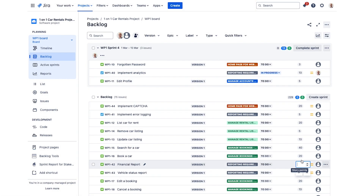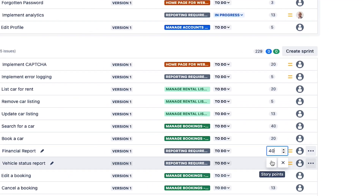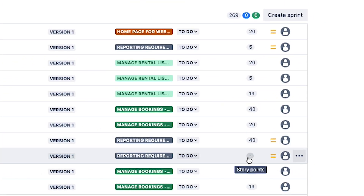It's very common to see teams bring product backlog items into the sprint which are too large. When product backlog items are too large, the team is not able to finish them inside a single sprint — and of course that's the cause of why they don't complete their sprint plan. So what can we do about it? The first thing we need to do is estimate the size of our product backlog items. Once we can identify the size, we can see which ones are too big and need to be split down.